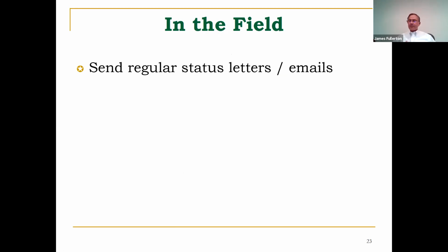I think it's fair to say that GCs really like receiving that. Owners really like receiving that. Here's what we accomplished this week, and here's what we intend to accomplish next week. Here's where we appear to be on schedule. We need selections from the owner on the following items, and we will soon be delayed from performing portions of the contract if we don't have that.